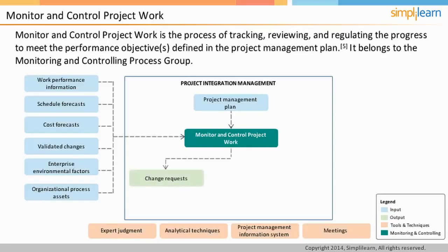Change requests could be in the nature of corrective and preventive actions or defect repair. If the performance measurement baselines are not being met, this process ensures that project manager takes appropriate corrective and preventive action to get close to the performance measurement baselines.